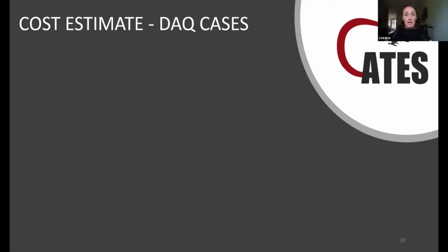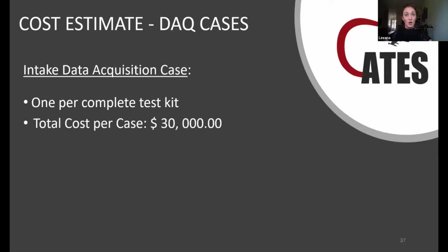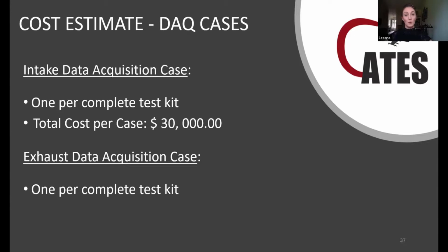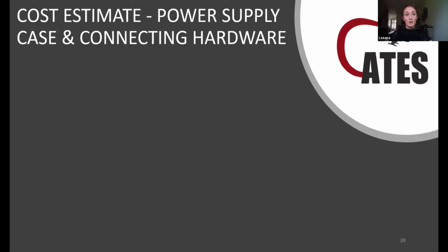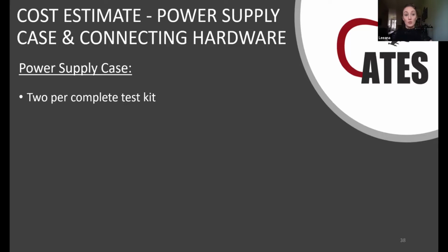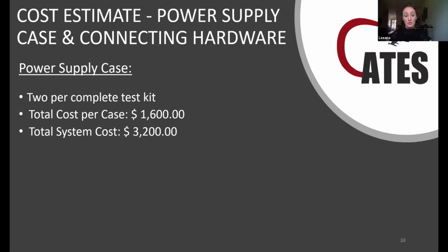The intake data acquisition case, we needed 1 per complete test kit with the total cost per case of $30,000. And then the exhaust data acquisition case, 1 per test kit as well, with a total cost of $30,000. From there, we move on to the power supply case. We needed 2 per complete test kit, 1 for the exhaust data acquisition case, and 1 for the intake.